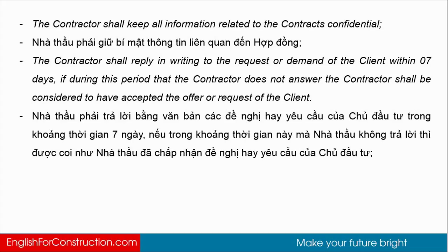The contractor shall keep all information related to the contract confidential. The contractor shall reply in writing to any request or demand of the client within seven days. If during this period the contractor does not answer, the contractor shall be considered to have accepted the offer or request of the client.